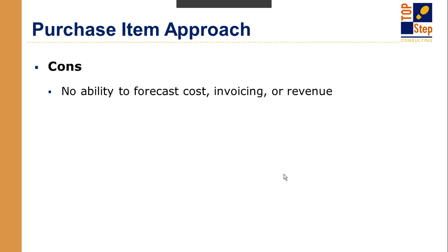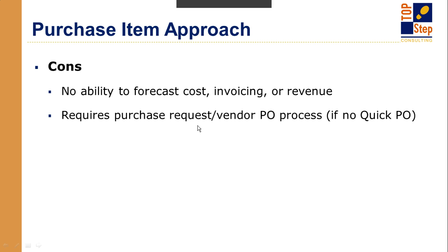Now, the downsides to this approach. The first one that should be mentioned and isn't is that you have to have the purchase module. And again, as I mentioned, not that many of the clients that I'm aware of have the purchases module. So you do have to have that in place before you can use this approach. It still doesn't provide you any ability to forecast. It also requires you to have some kind of a business process and workflow built within the system for your purchase requests and vendor PO processes.